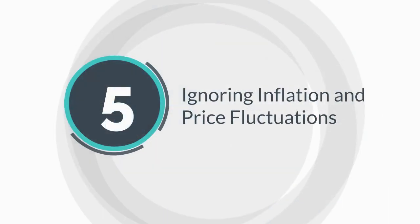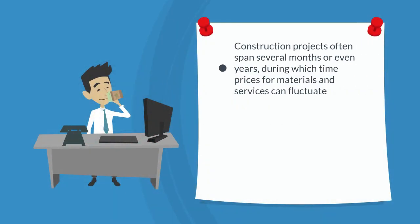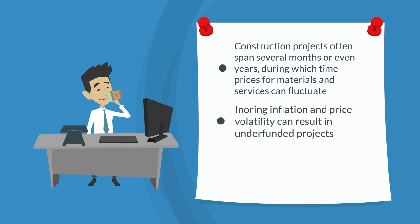Five: Ignoring inflation and price fluctuations. Construction projects often span several months or even years, during which time prices for materials and services can fluctuate. Ignoring inflation and price volatility can result in underfunded projects.